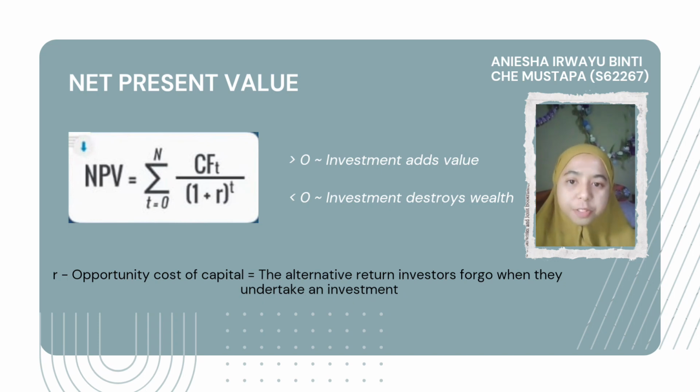When NPV is positive, the investment adds value because it compensates for more than the opportunity cost of capital. That's why a company undertaking a positive NPV project creates value. The opposite is also valid: accepting an investment that has a negative NPV destroys wealth.